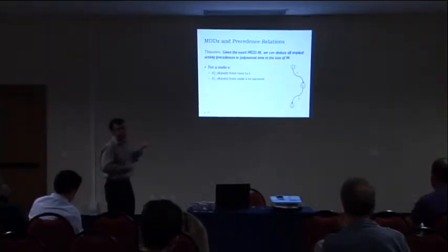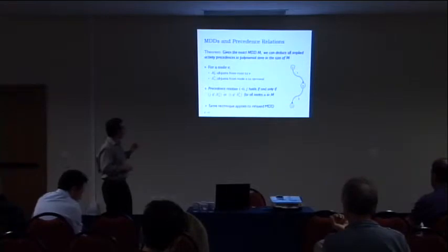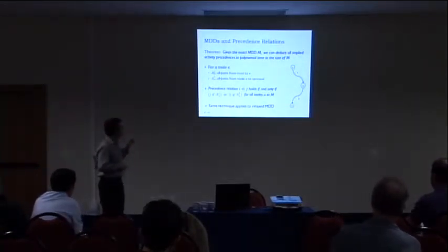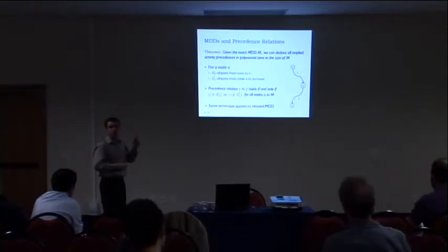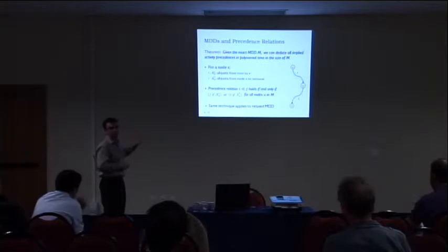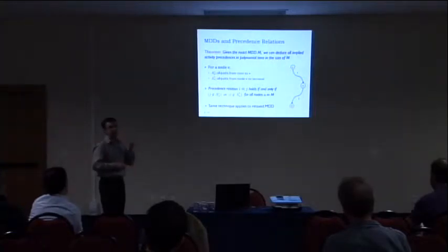And then you also collect the same information, but from a bottom-up perspective. So all the labels that belong to all paths from the terminal to the node V. Okay? So if you have two activities, i and j, you know that activity i should precede j if, for all the nodes V, you never have a relation where they are both inverted, where j begins first than i. This is all this condition is telling you. So you can collect this information with a very simple dynamic programming argument, and you can use this state to deduce these precedence relations.